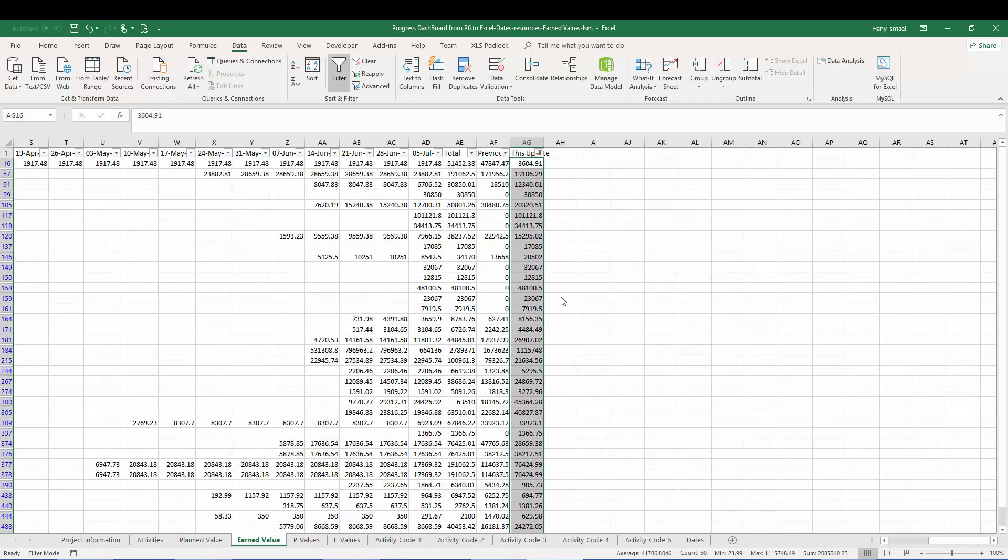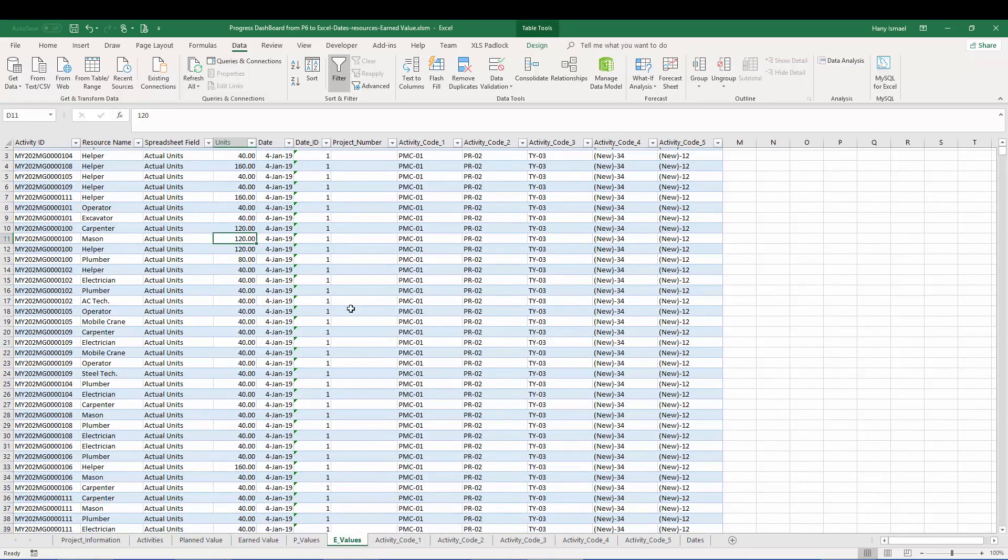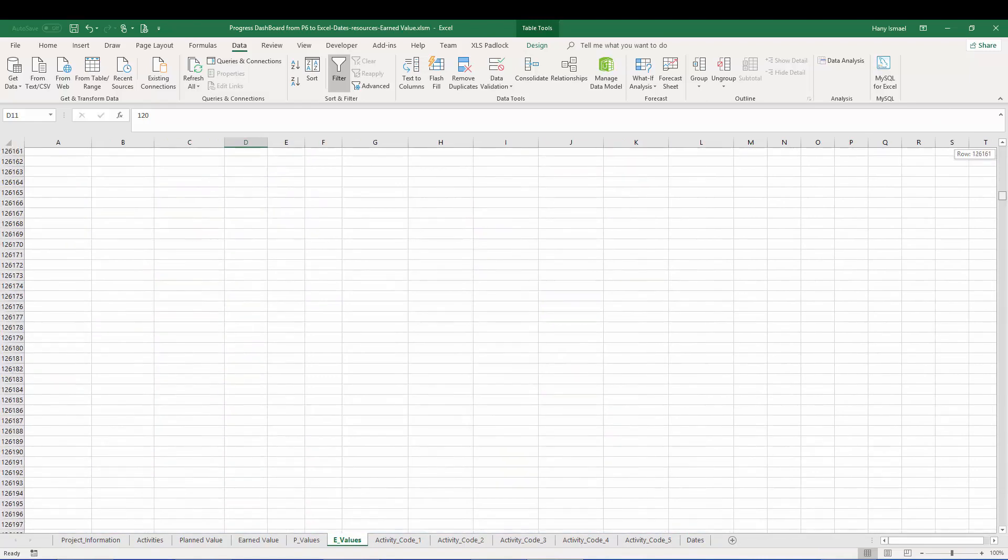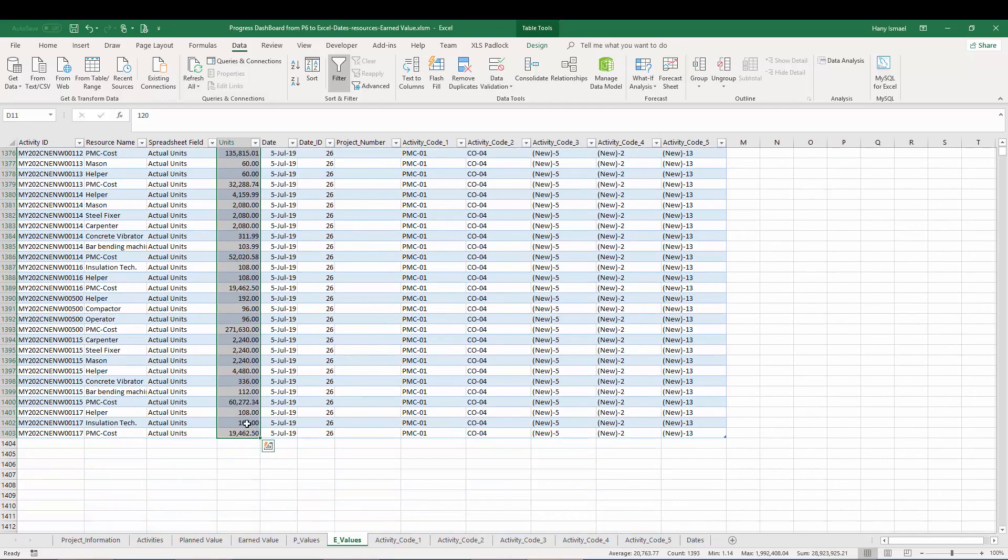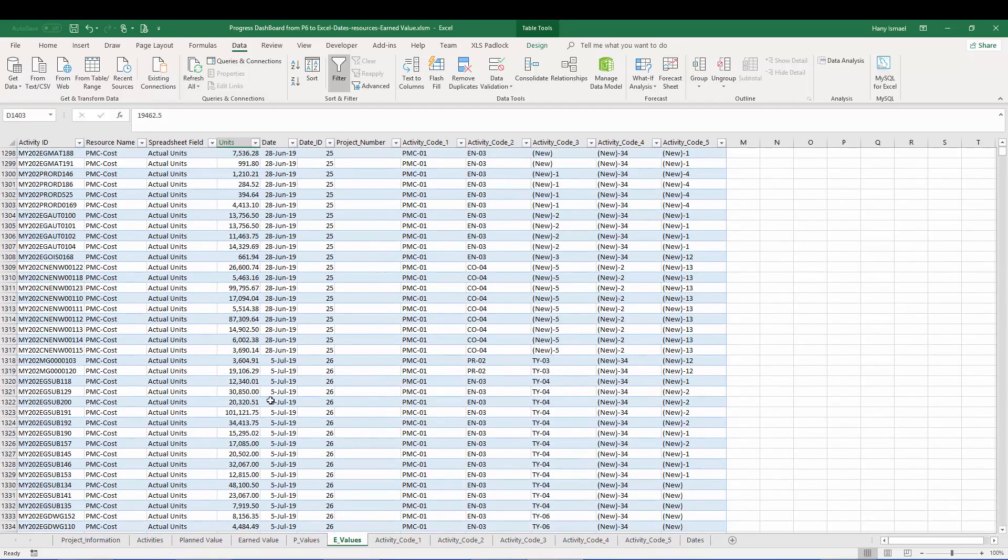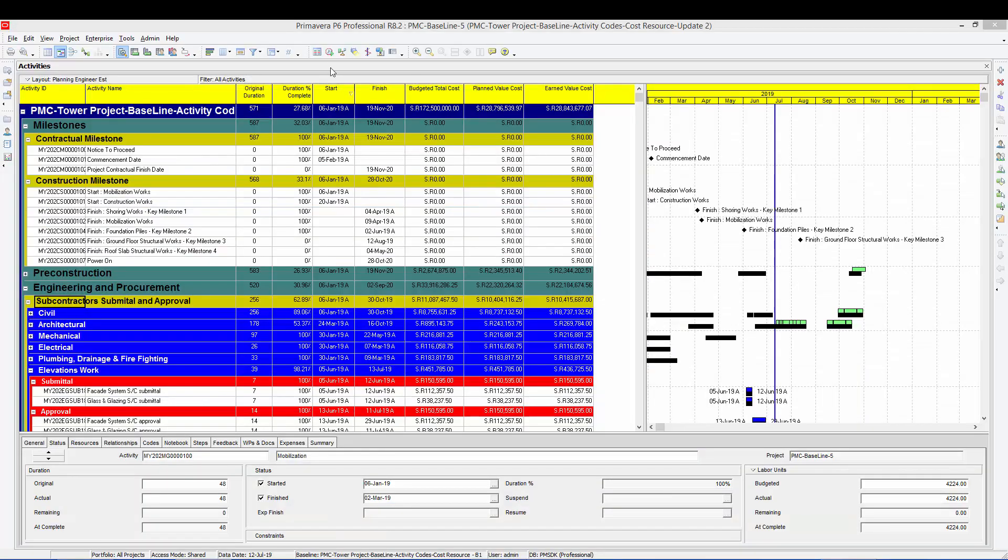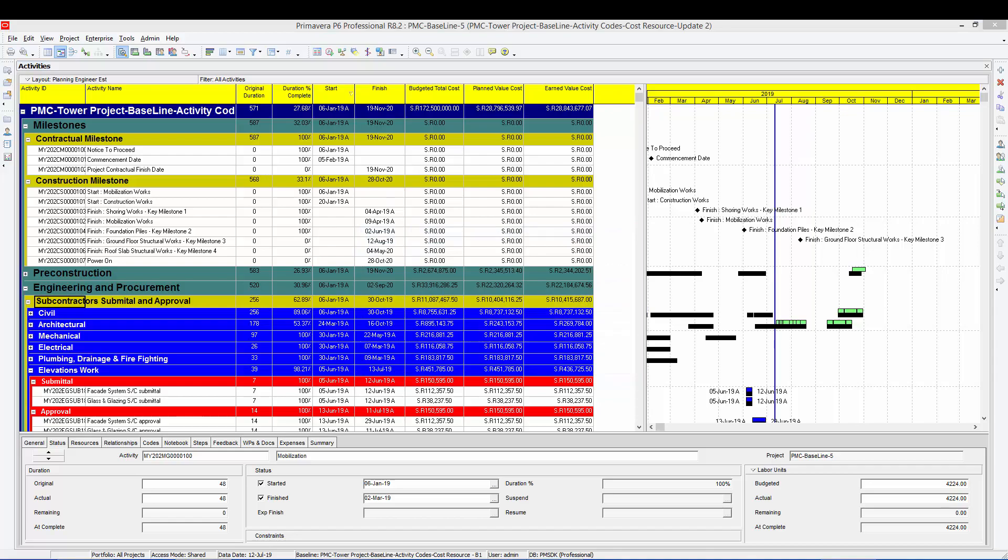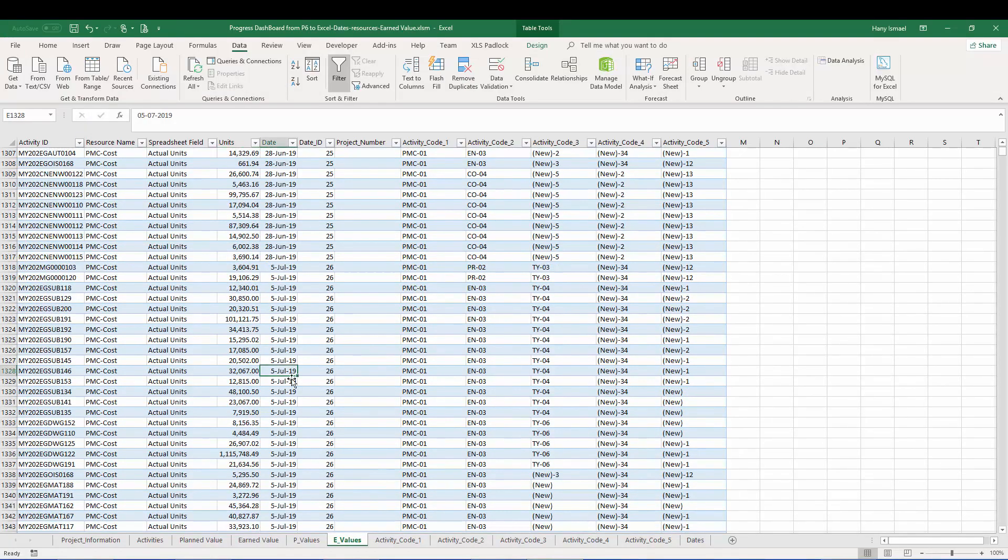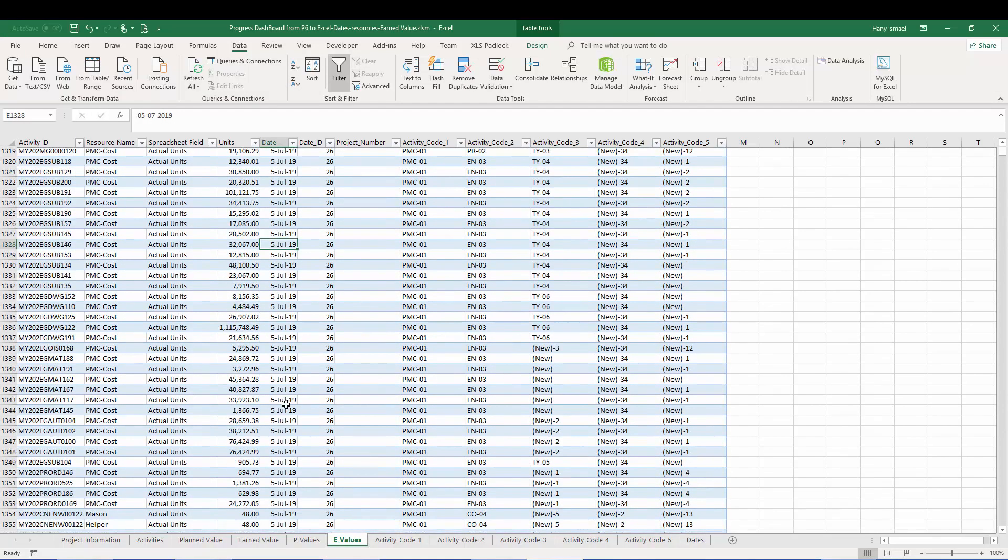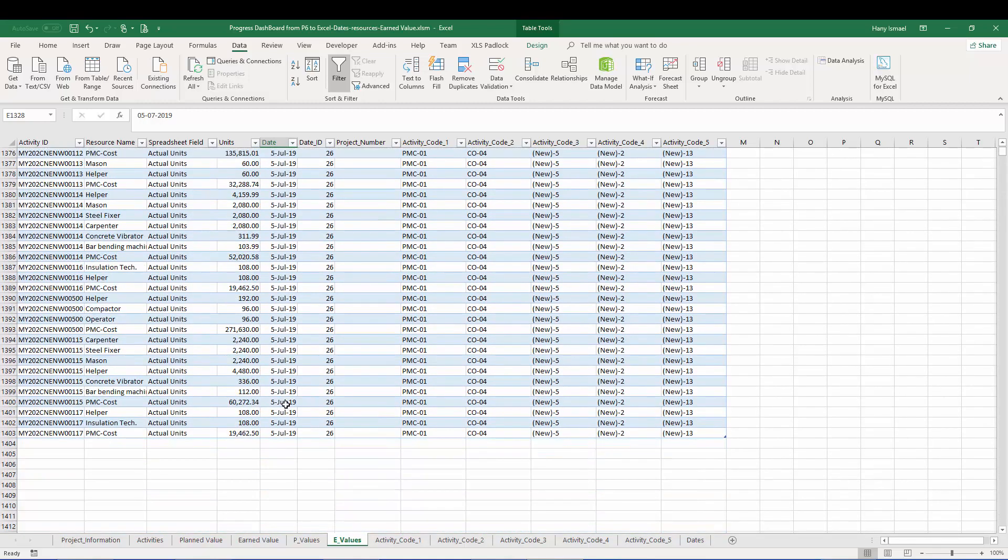As you can see here, the process already completed and this is the items with this update only. So if we go to the earned value, we will find here that at the very end, we will find that there is one set of data was copied. But you might ask yourself one question here. Here the data date is 12 July where the data in the progress was put in the 5th July date. Why? Because we are here talking about the week starting 5th July. So this week will start from 5th July up to the data date. So this is correct.